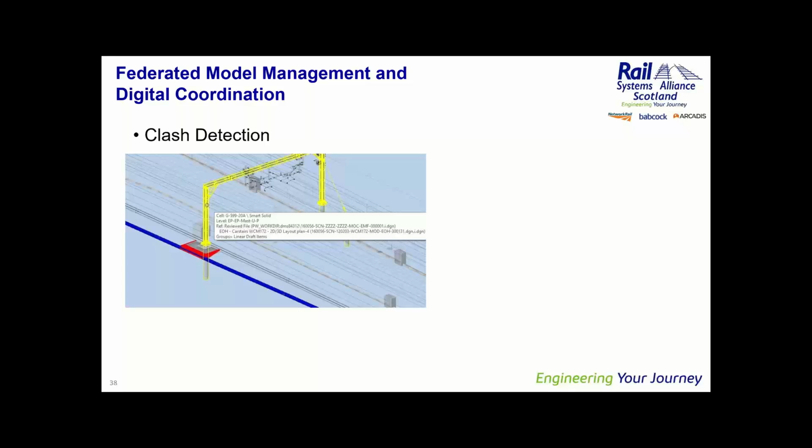We do more of these on our big IUT projects. I think the domestic projects with their fast pace, they do their discipline coordination as they progress, and it works very well for them. But on the larger multi-discipline, multi-organisation IUT projects, a bigger scaled clash detection exercise is often necessary.